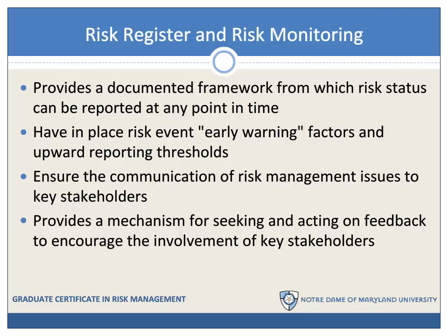With the risk register, management has in place early warning factors for risk events, and these can trigger upward reporting thresholds that inform risk managers and staff about when to notify higher authority in the vertical team.